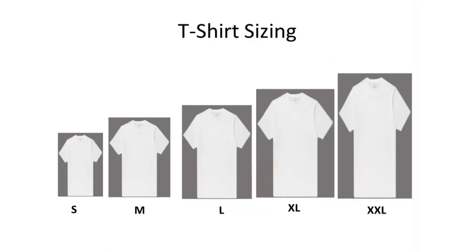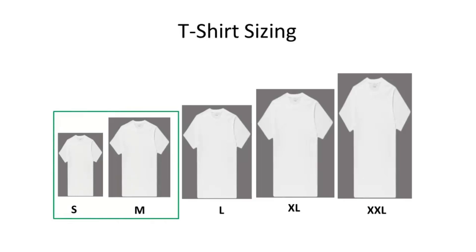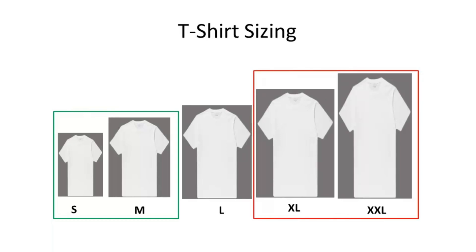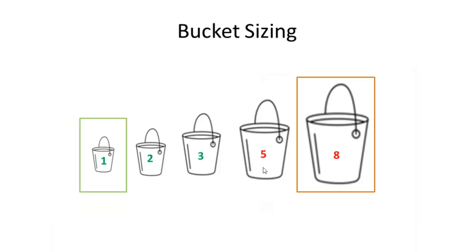Now let's move to T-Shirt Sizing. T-Shirt Sizing is a relative estimation technique commonly used in Agile implementations, especially where the team is new and the backlog is large and uncertain. Teams collaborate, discuss, and finally make a choice together for each requirement. The size of all requirements is estimated against one base requirement. The more the requirement is clear, the lower is the size selected; the more complex and unclear the requirement, the higher is the size selected.